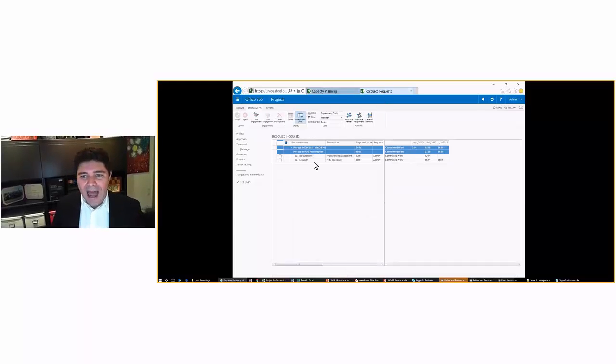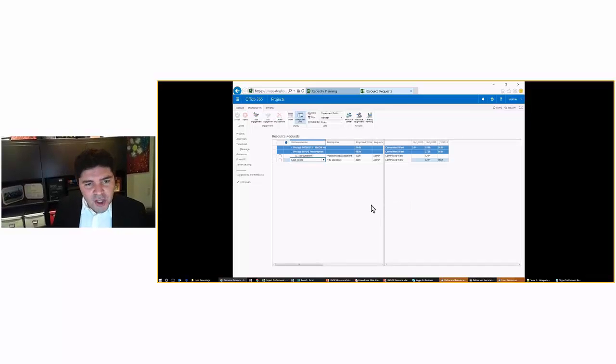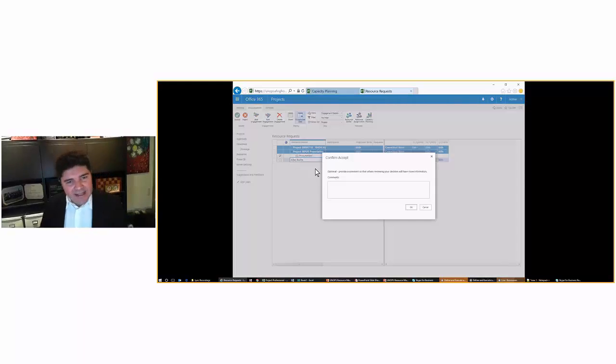So when I go back, how can I give Allan as a retainer? Simple as this. I just select someone who I know has the availability and I accept. By doing this, Allan matches the requirements. And okay, for procurement, I don't know yet who is going to work on this, but I can do two things. I can guarantee that I will hire someone, so you can accept as a procurement and say we probably need to hire someone.